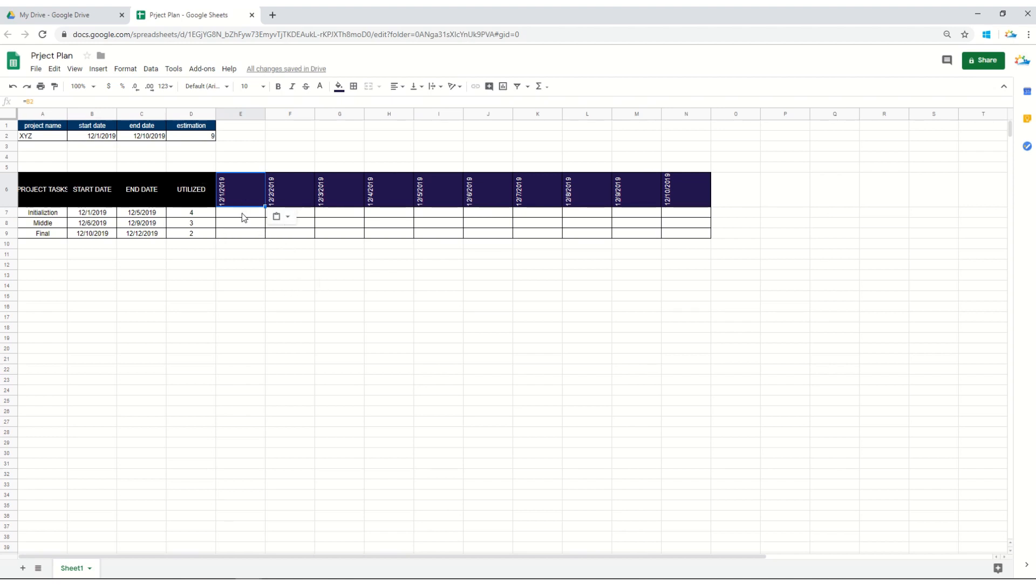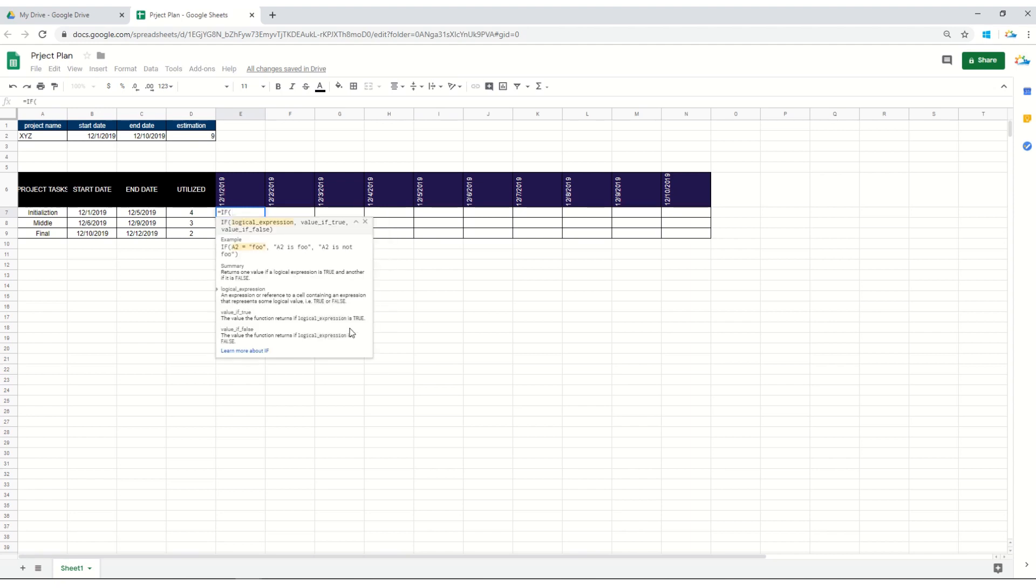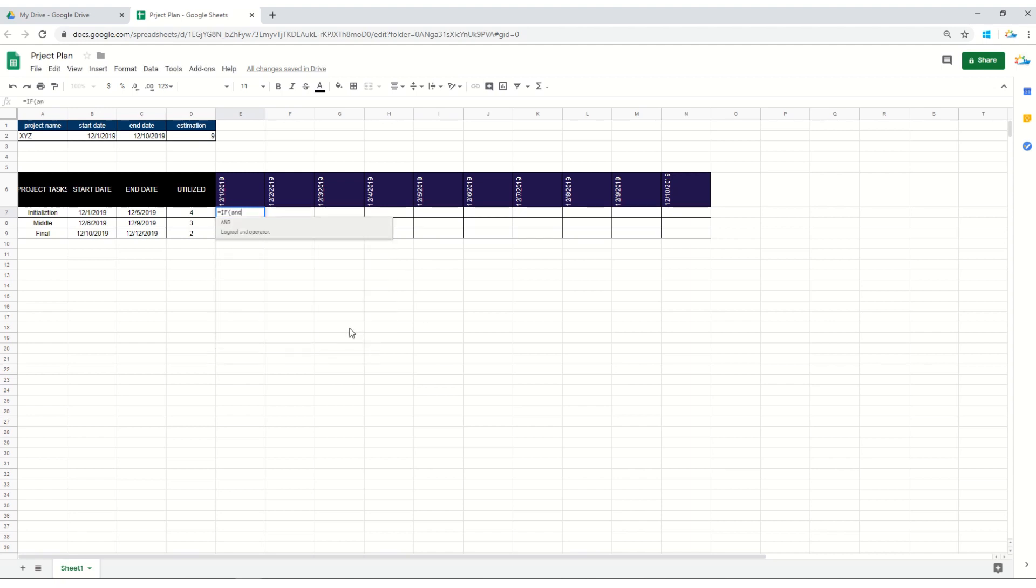Now we are tracking progress on a daily basis, so you would like to input some IF formula, some conditional formulas with logical operations. Start with the formula and use the logical operator AND. We are using AND because we would like to compare if this date is greater than or equal to the starting date of this particular task.